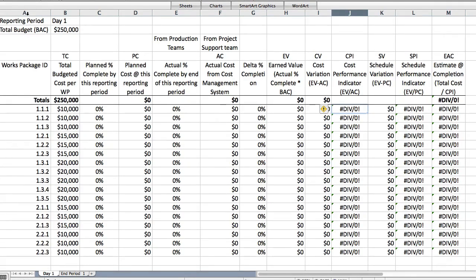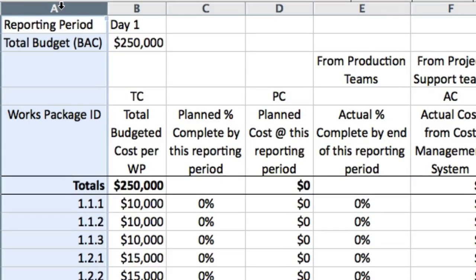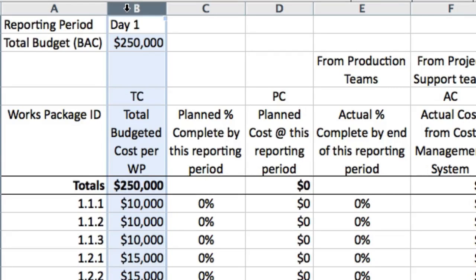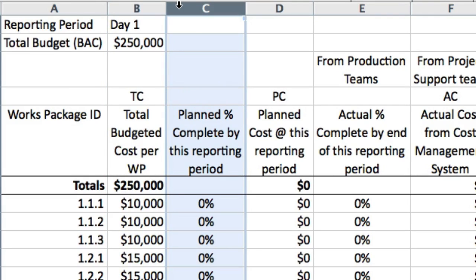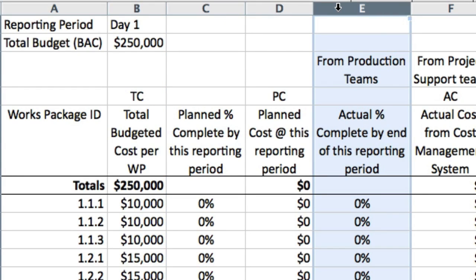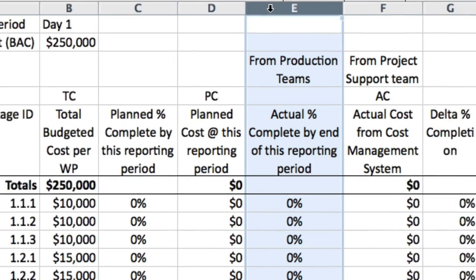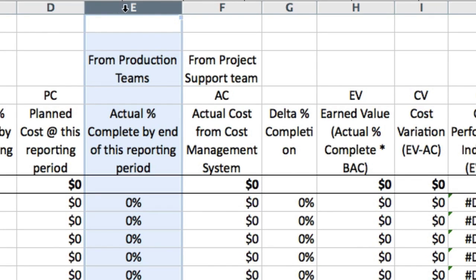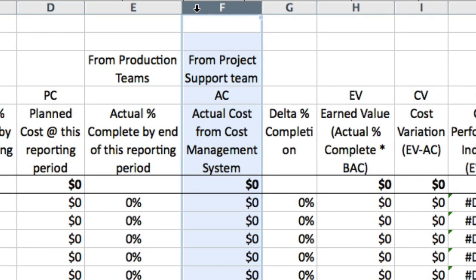We're looking at the empty spreadsheet as it will be on day one. The headings include column A: the works package ID from the WBS dictionary; column B: the total budgeted cost of each work package from the baseline budget; column C: the planned percent complete by this reporting period from the baseline schedule; column E: the actual percent complete by the end of this reporting period, obtained from site inspections by the production teams doing the work; and column F: the actual cost from the project cost management system.